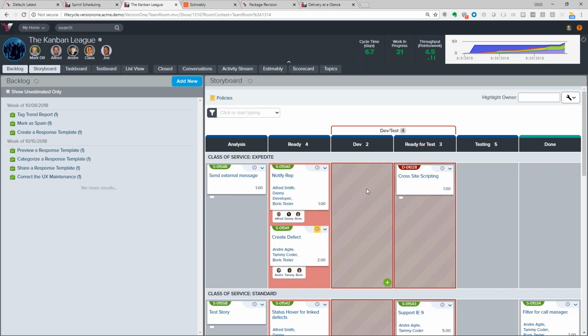So in here, we're tracking a WIP, so we can check work in progress, how many things we want in this specific category. We're also grouping categories, as you can see here under Dev Test. So you can group that work together as well and put a WIP limit on the group or on the individual work as well. We do track the start of the cycle and the end of the cycle, and then have work item cycle time reports that'll help us to track all of that.